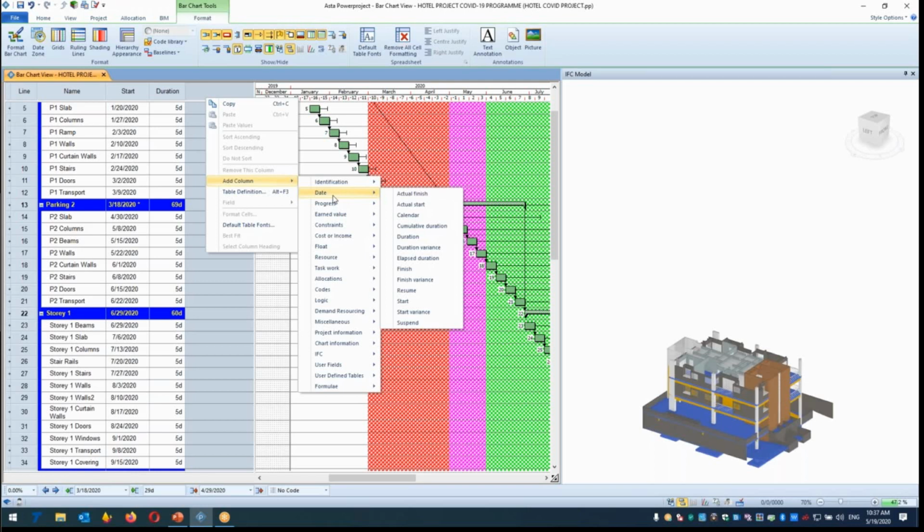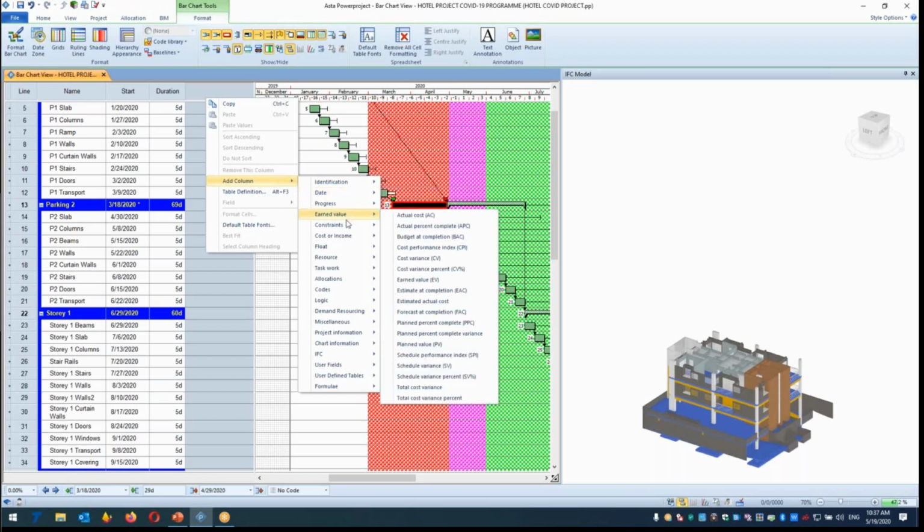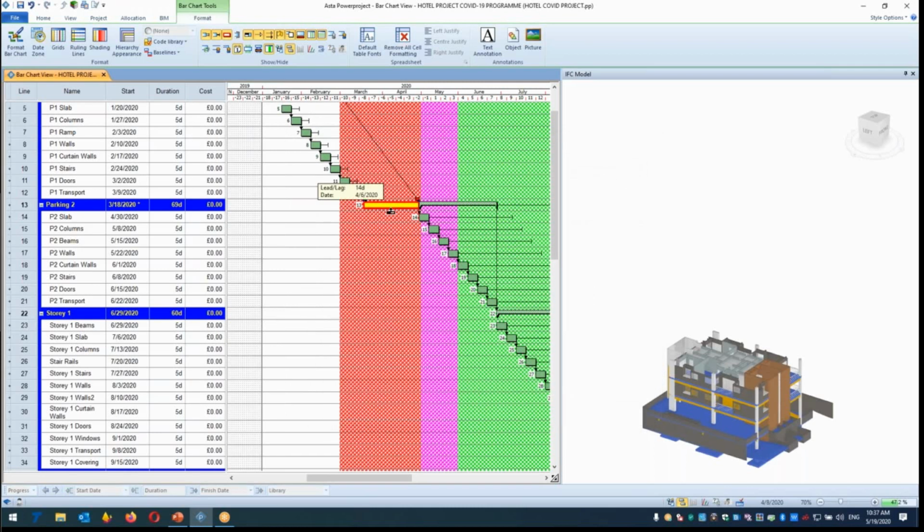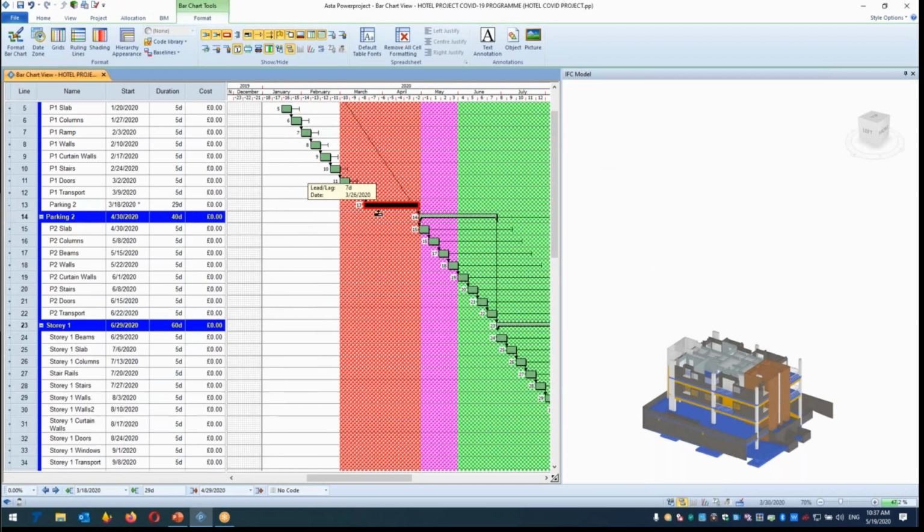So if you have a cost-loaded schedule, a resource-loaded schedule, because of the time extension, your resource usage, especially for equipment, is increased even if you are not working in the field, because you will use it more. But this is just a simple sample I want to show about the cost. You can add the cost to any specific activity. For example, I created this task here, and in this task I would like to put the cost of, let's say, COVID activities, COVID cost.